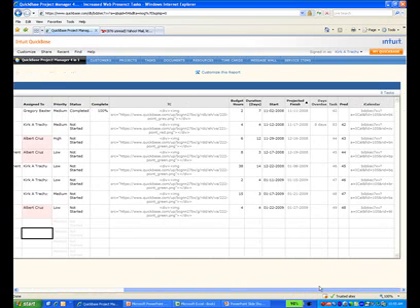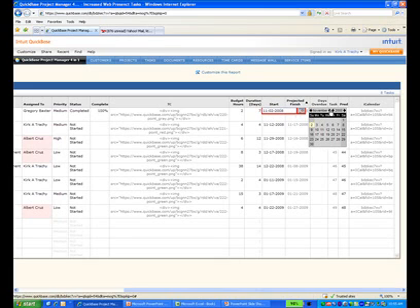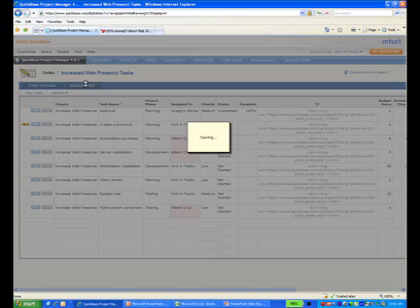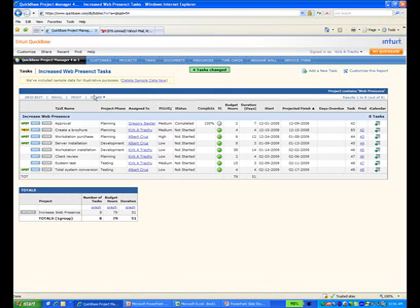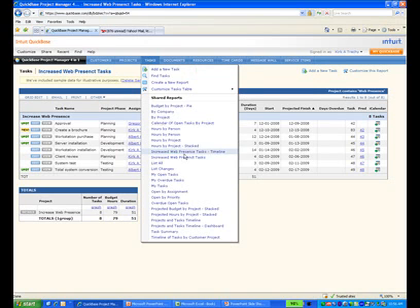Let's move over for a second and look at this November 2nd date that we had here. Remember, it went out to January 27th. What if we change this to December 1st? Which is really a possibility. The critical path that's inside here will automatically be updated. Let's save this so that we get an idea of what's happened here. Save and done. The assignment, Colleen being on vacation, is now reflected here. The dates now push us out to 2/17. And that report is right here.